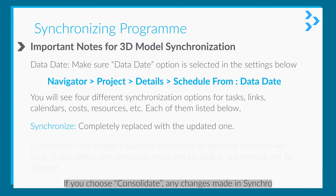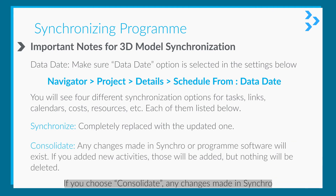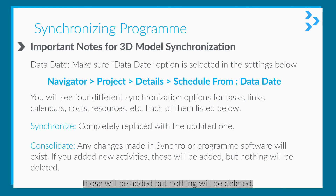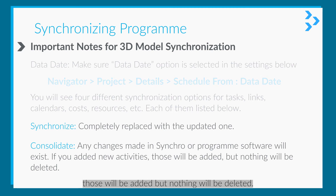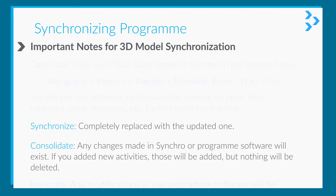If you choose Consolidate, then any changes made in either Synchro or the program software will be preserved. If you add new activities, those activities will be added, but nothing will be deleted.